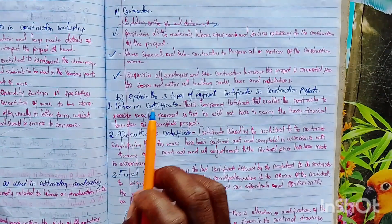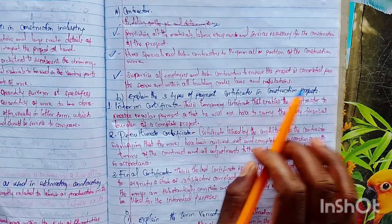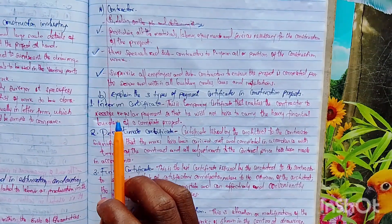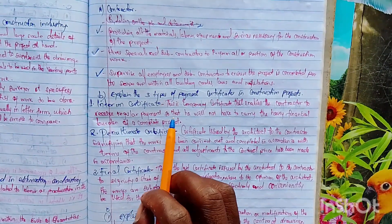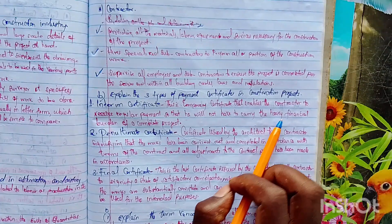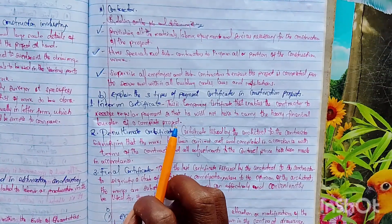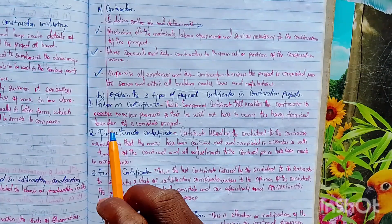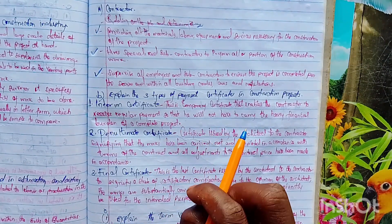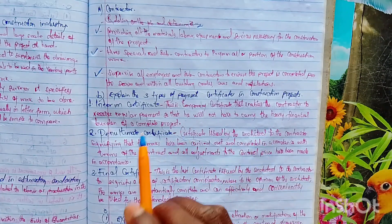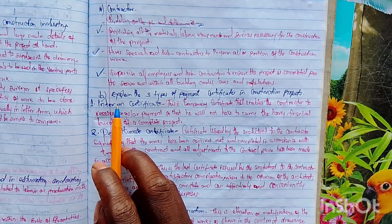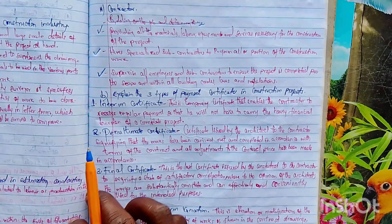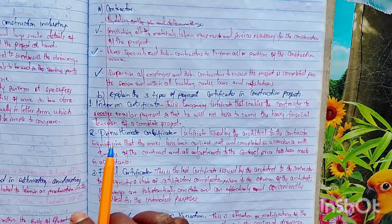The interim certificate is a temporary certificate that enables the contractor to receive regular payments so that he will not have to carry the heavy financial burden of completing the project alone. This is the first certificate that is issued by the architect to the contractor.